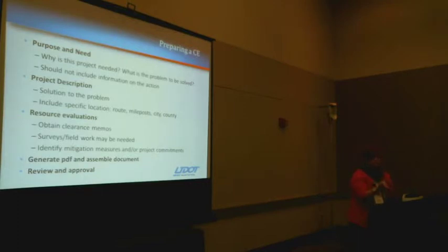You either have to let the designer or the PM know, well, if you change that in the field, you have wetlands right there, and you have to decide now, are you going to avoid them, or are you going to impact them? And if you're going to impact them, we might need a delineation, we might need a permit, and that could force them to decide, okay, we're not going to do that on this project. Or at least they know up front, so that when the RE comes back, you can say, well, I told you that you were going to need additional environmental review, and now we have to do that.